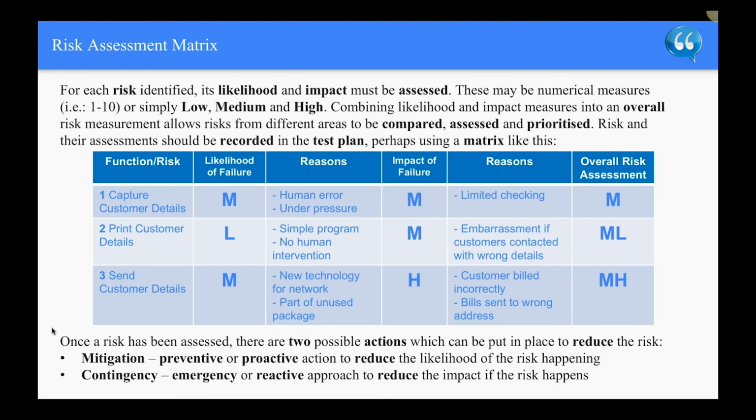And moving on to two, print customer details. The likelihood of failure is low. It's a simple program, no human intervention. The impact of failure is medium. The reason is embarrassment if customer contacted with wrong details. So the overall risk is medium low.